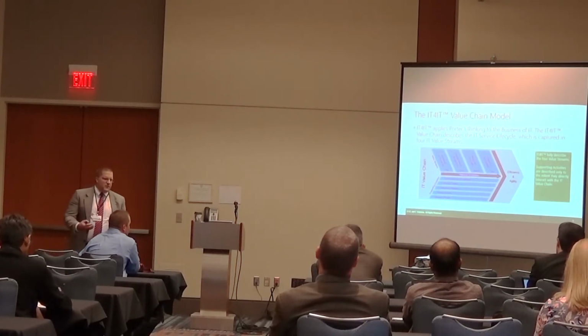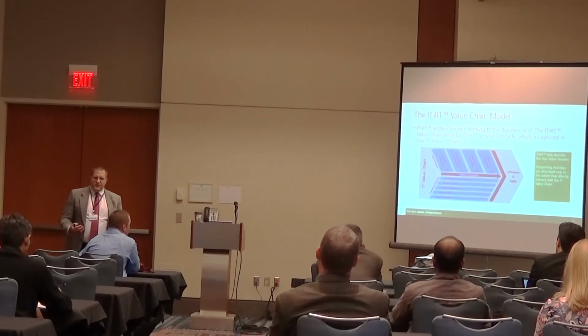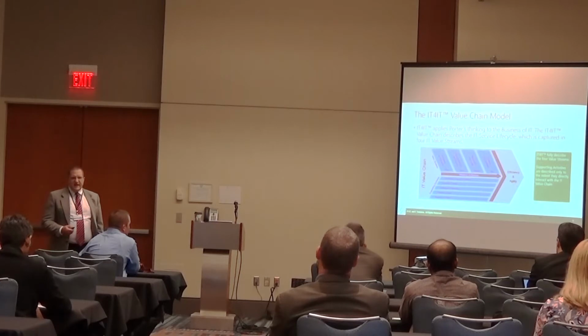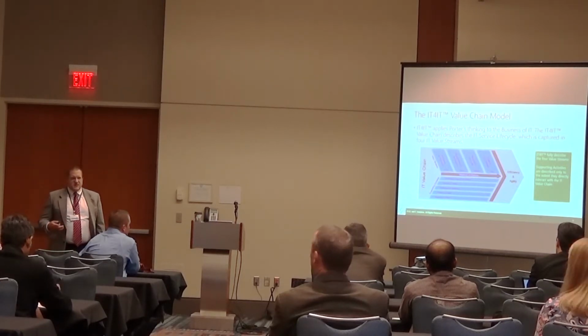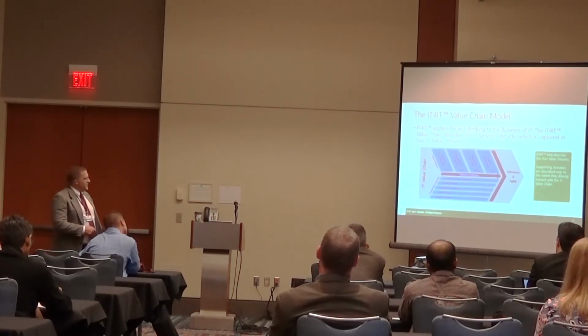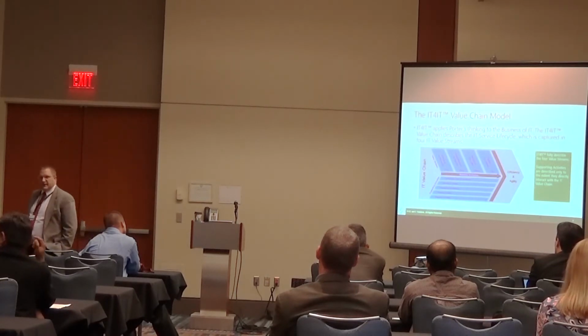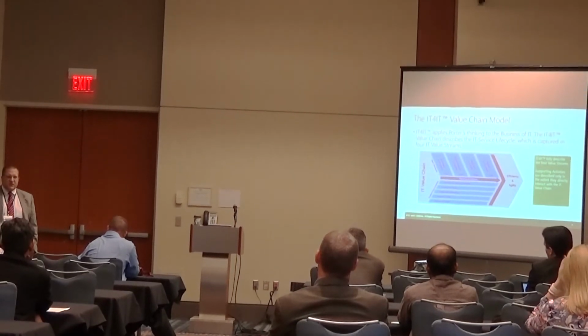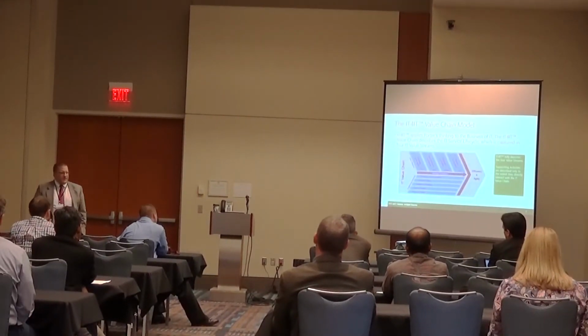And when we sat down and we looked at their organization from a value chain perspective, what came out was, yes, they could do that work and they would get some level of benefit to the organization, but they didn't have good process in the strategy and portfolio space. They didn't have clarity on decision making around what work was going to get done. So until they fixed that, until they knew that they were doing the right work, it didn't matter that they were doing the work better, right?